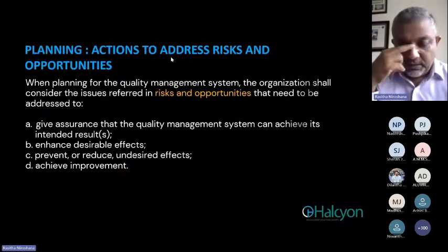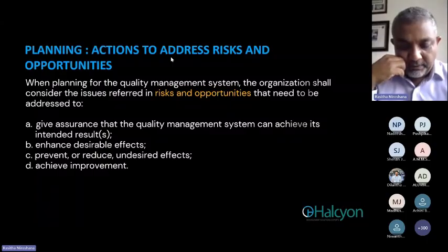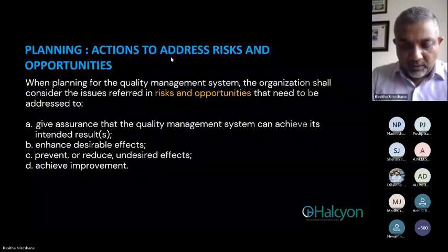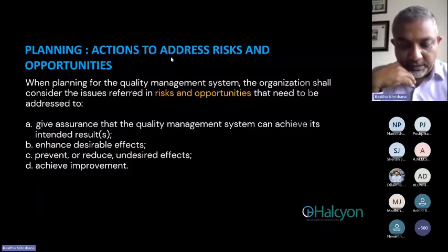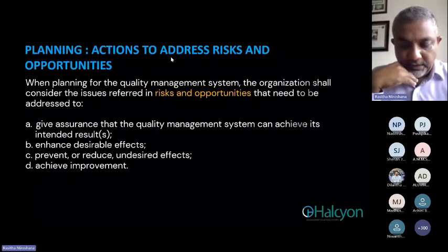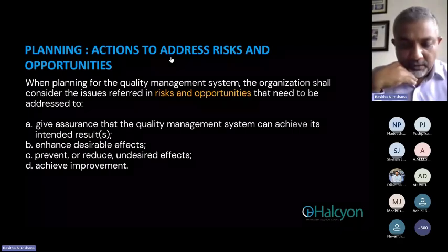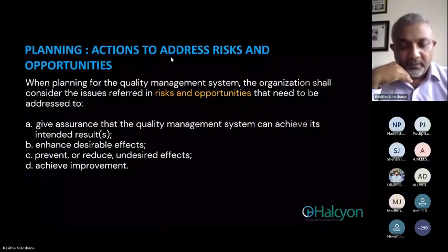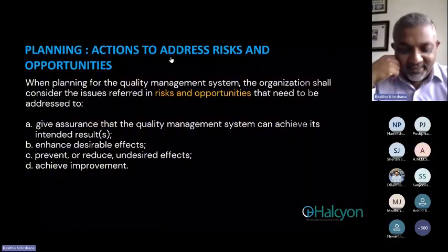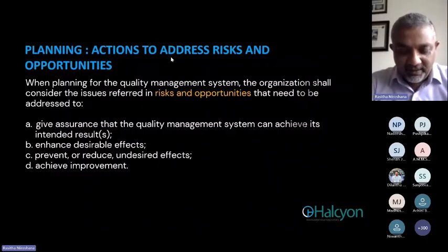Then Sanjeevan, the OSHA's office action plan, you could then plan also a structured 6-month timeline to enhance environment, health, and safety compliance. In the first month, an initial EHS audit will be conducted to assess compliance with CE, NEA, and 1445 standard. So Sanjeevan, you maybe work with Mr. Kamal, right? 1445 standard, is it? Yes, sir. Okay. Identify gaps and set priorities.